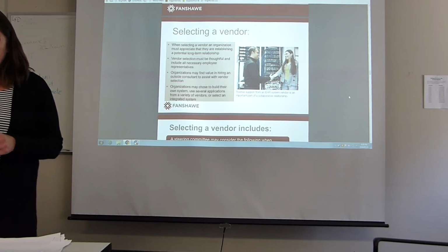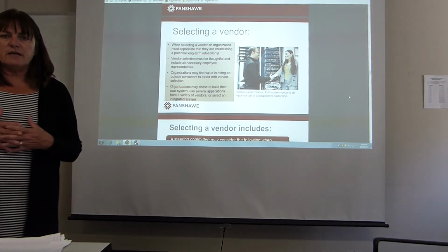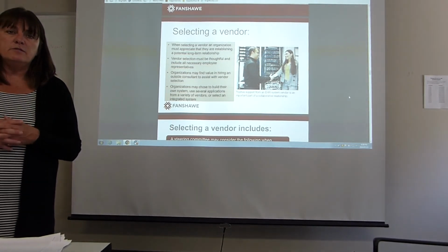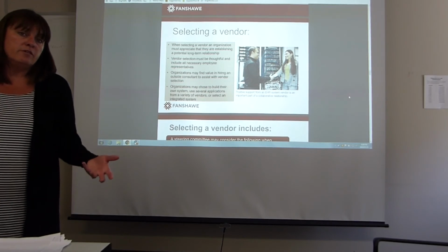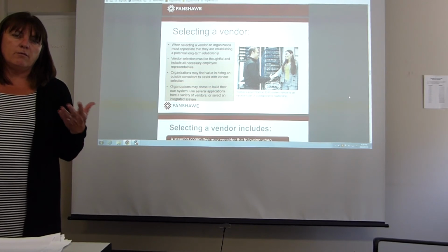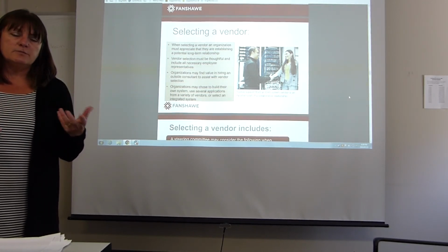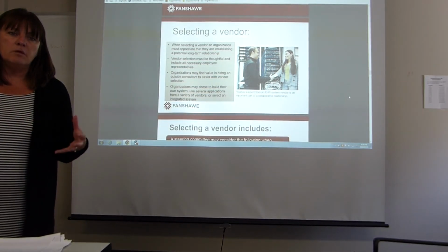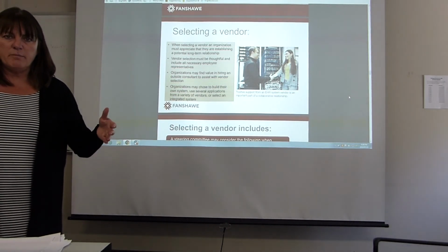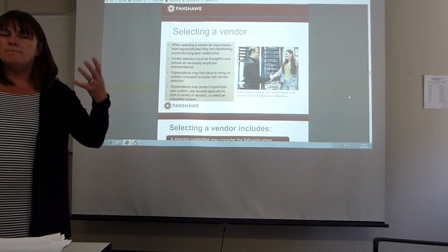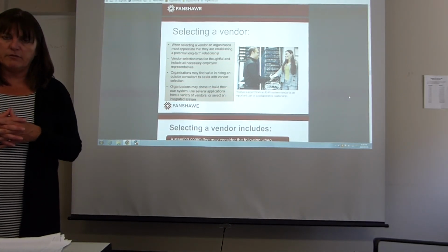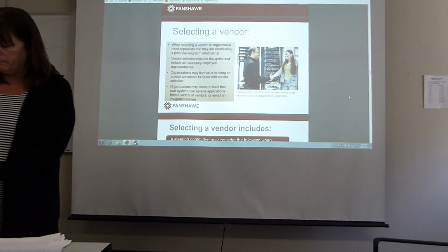Organizations may also choose to build their own system using several different applications from different companies, and that can occur. We didn't use a Cerner radiology system, and I don't even know if one exists; we used a GE system and interfaced it in with Cerner PowerChart, as we did with other systems like Muse for the cardiology system. So sometimes it's a complete one-stop shopping system that'll do everything, but if they're not out there, sometimes we will have to add those extra systems so that the information is interfaced and interoperable.